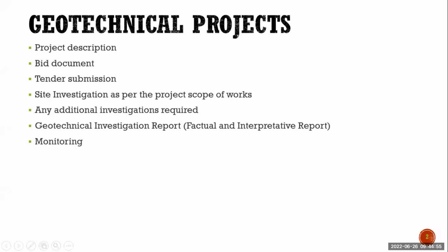Once it is selected, that particular contractor will do the site investigation. And very importantly, they will do the site investigation as per the project scope of works, which is defined in the bid document. Then if any additional investigation is required, the engineer will tell based on the site investigation that has been performed.